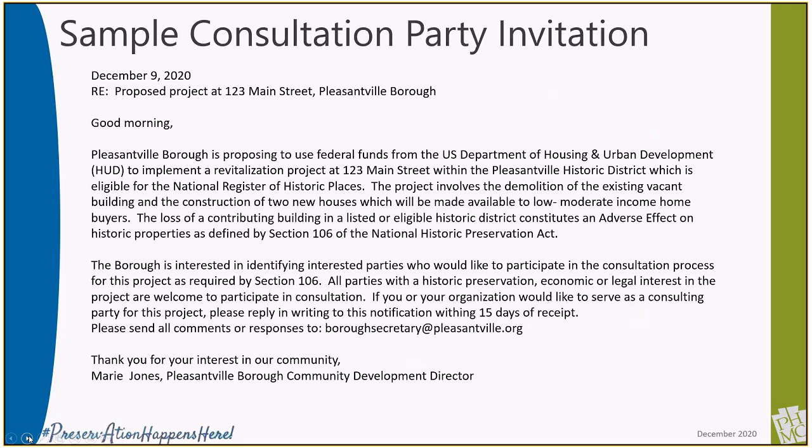Now we'd like to give you a few tools to help you understand how to carry out the consultation process. You should have received a copy of this sample consulting party solicitation letter. This invitation to participate as a consulting party for a specific project can be sent via regular mail or by email. Be sure to send a copy to the SHPO to document your efforts. This sample text contains the suggested language to explain to potential consulting parties why you are contacting them and what their role would be in the process.